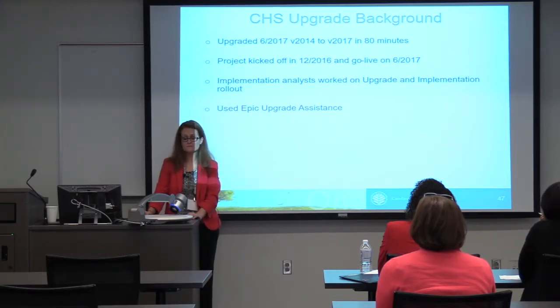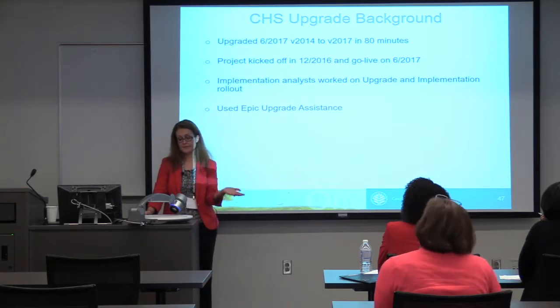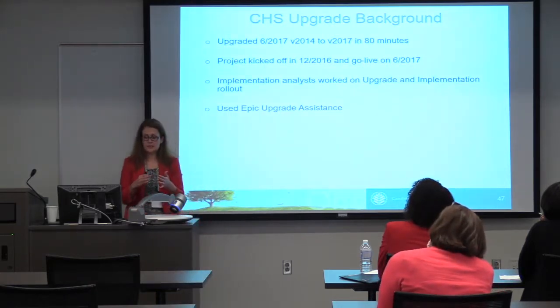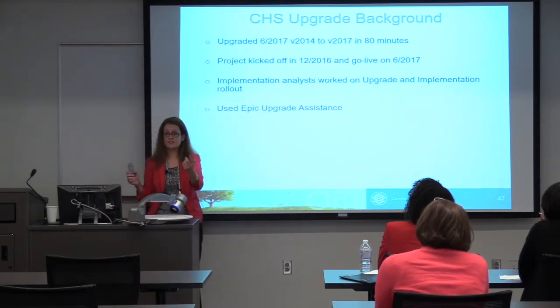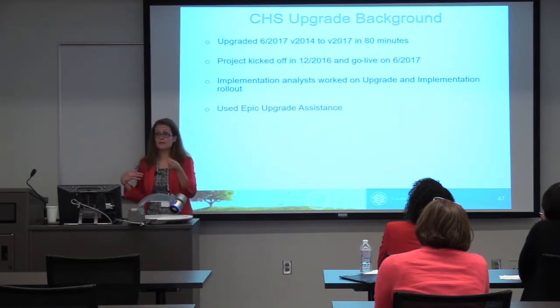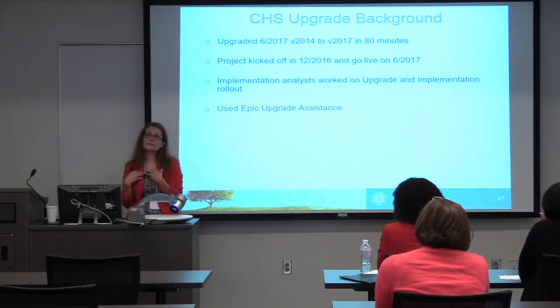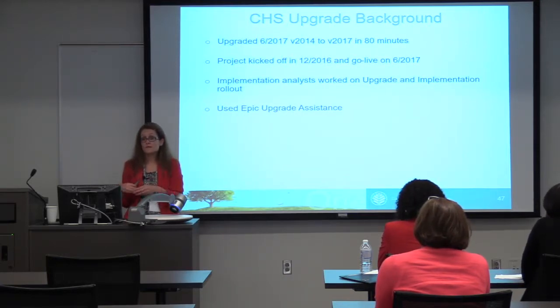But absolutely, a little bit more to your question, right now we have special updates that they're called, and we take packages from Epic every other month, so that we're able to get some new functionality that we may need to resolve issues, or it's just a nice to have. So we take updates from them every other month as our personal schedule that we have, until we get the big upgrade that will have a lot more functionality in it.